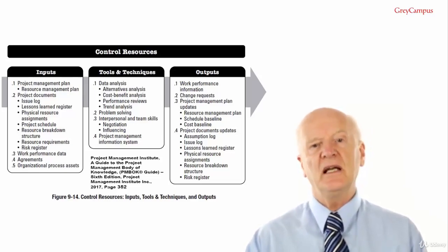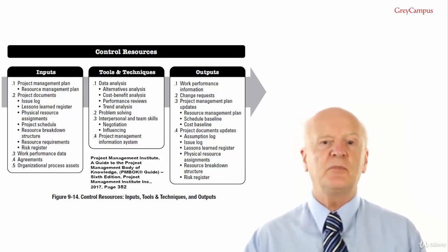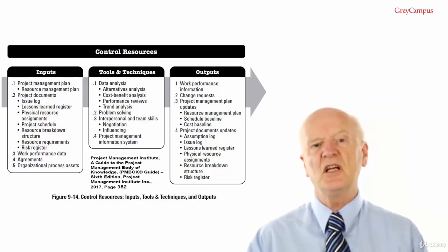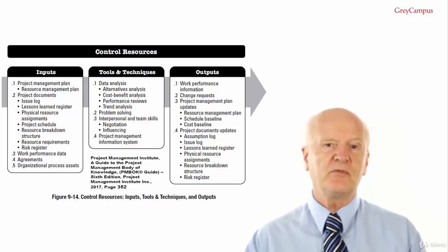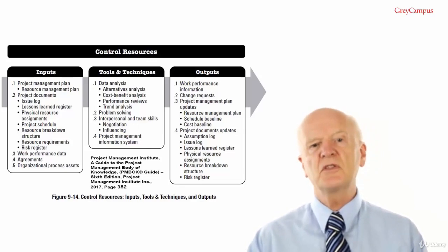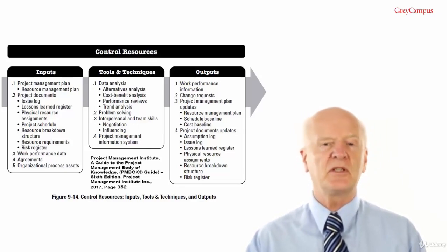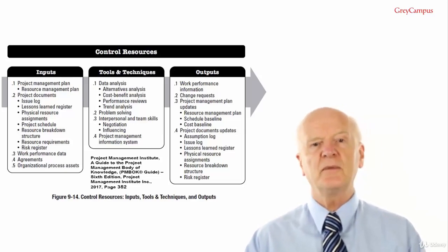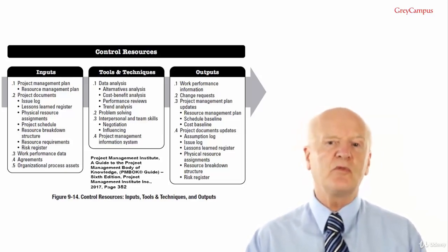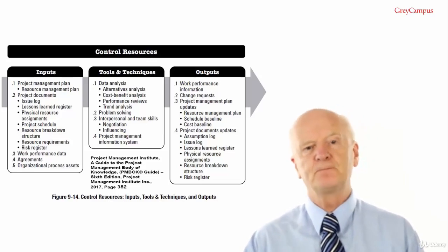Trend analysis. As a project continues, the project team may use trend analysis based on current project performance to determine the resources needed in upcoming stages of the project. Trend analysis examines project performance over time and can be used to determine whether performance is improving or deteriorating.